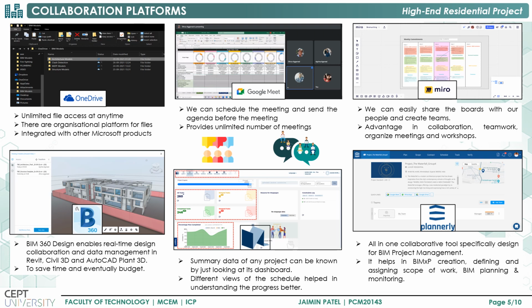Then these all are the collaborative platforms which we use for our project for better coordination, which are OneDrive for sharing and storing files and the Revit models, then Google Meet for group meetings, Miroboard for brainstorming and listing our weekly commitments, then BIM 360 for design model collaboration and data management, then Visilin for PPC tracking and schedule updating, and lastly the Plannerly which we use for BIM execution planning.